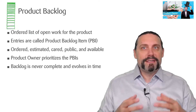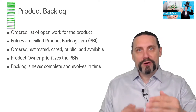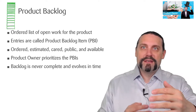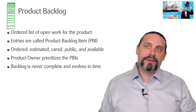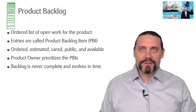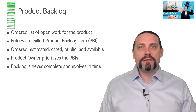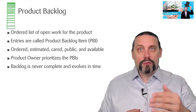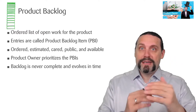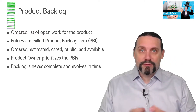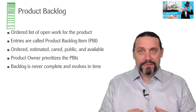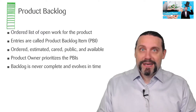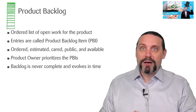The product backlog is an ordered list of open work for a specific product. On top we have all the refined items, and on the bottom we have the less refined or not yet refined items. A product backlog consists of product backlog items and they are all ordered. They are estimated at the top, and the product owner takes care together with the team about these product backlog items. Such a product backlog is always transparent and publicly available.